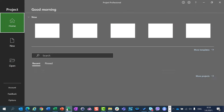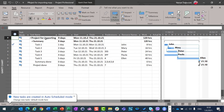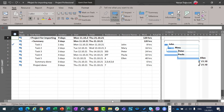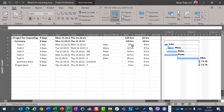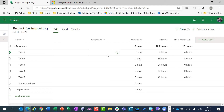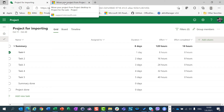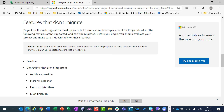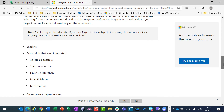Let me open the project that was imported. This project summary task was not imported. Work and actual work is effort and effort completed in Project for the web, but resources were removed. Be aware that this is not everything that cannot be imported. If you want to see the whole exhaustive list of what will not be imported when importing from Desktop to Project for the web, you can see it here on this page.